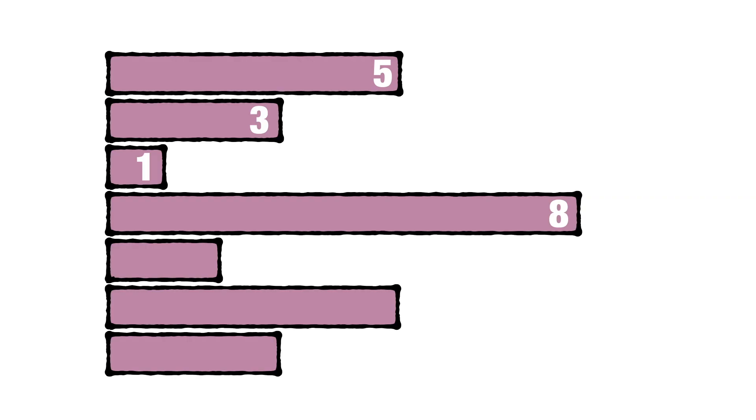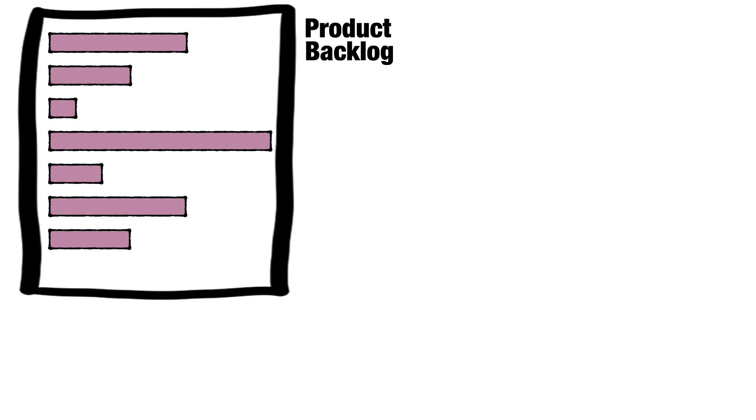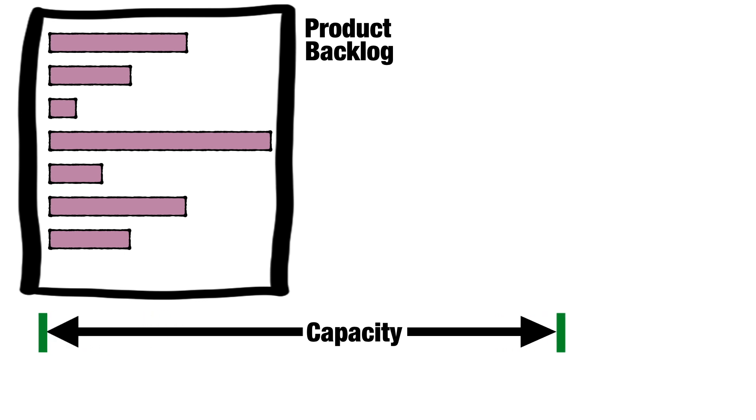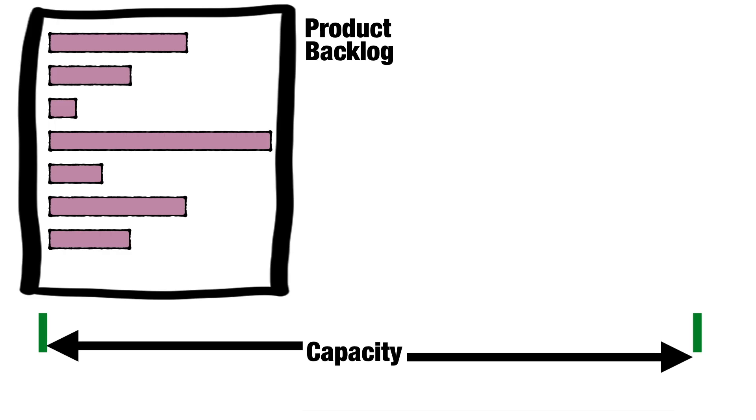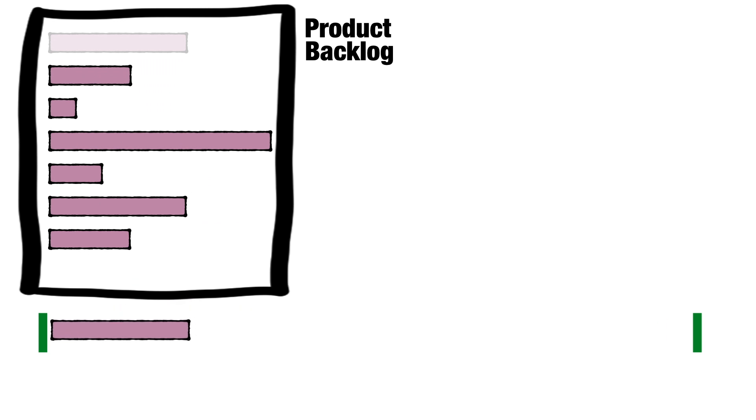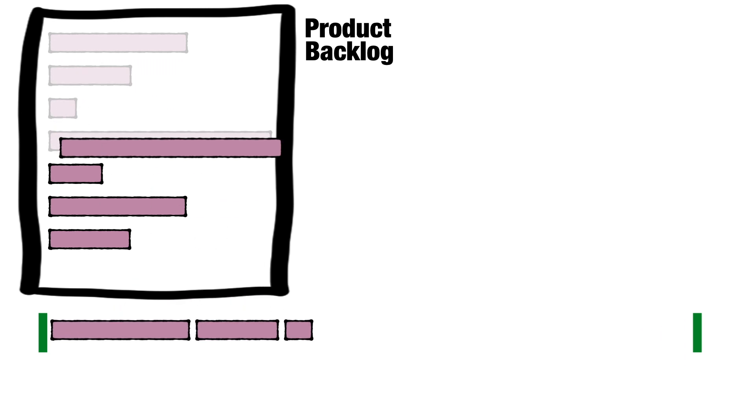I'm going to represent the relative size visually. It's common practice to size using story points, although you won't find a mention of story points in the Scrum Guide. And if the team has a few sprints under its belt, it will have an idea of its capacity — in other words, the number of story points it can process during one sprint. So you have a prioritized list of sized things to do, and a capacity.